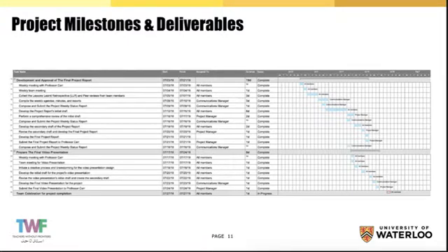The project milestones section presented all the deliverables and respective key activities with their due dates to provide a detailed and sequential schedule for the project. During the SLO research, the course curriculum was divided into 7 batches, and the submission of each batch corresponded to a milestone. The sample of the detailed illustration of key activities for each milestone and their timelines are presented in this Gantt chart.